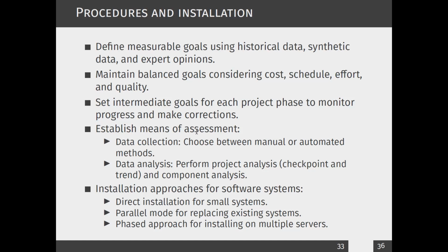For example, the aim could be developing an information system for, let's say, managing a university, but then you have to have intermediate goals, right? For example, handling student activities might be one, and then you can go with the lecturers and so on. So it's always better to have several goals so that monitoring the progress will be easy.